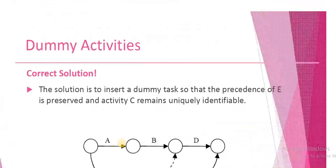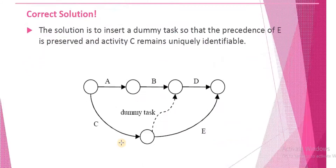This situation is also not valid. So what will be the solution? The solution will be to add a dummy activity. The valid solution is to insert a dummy task or dummy activity so that the dependency of E is preserved and activity C remains uniquely identifiable.